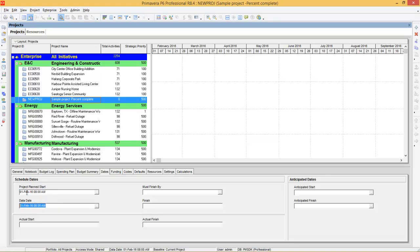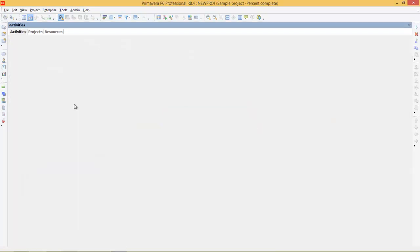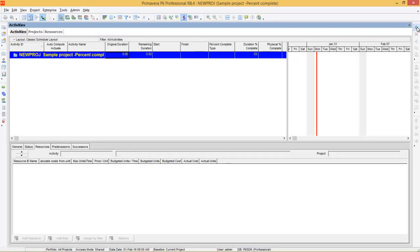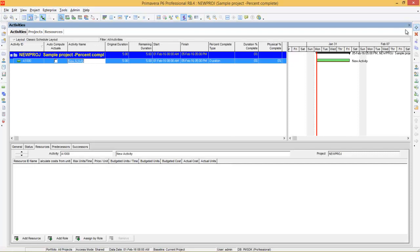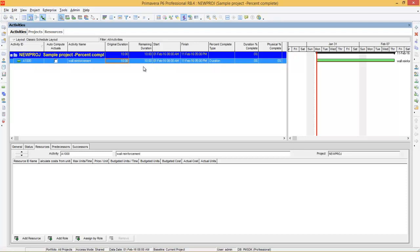Make sure your data date is the same as your project plan start. Then you can open the project and create an activity, name it as wall reinforcement, which takes 10 days to complete. Now you can see the schedule — it is starting on 1st February 2016 and finishing on 11th February 2016.